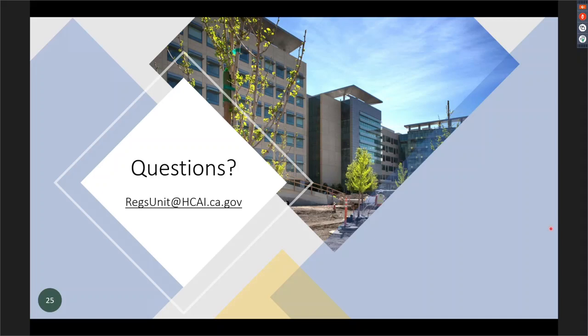Do not ask us to review RFIs, because our staff are told, do not review RFIs, so you're going to get a no. Now, again, if you have an RFI, you're not sure if it's NMA or not, and you say, can you look at this to tell me if it's NMA? Go ahead and ask the question. Just make it clear that you're not asking them to review your RFIs. There are several questions on this, very similar on this presentation alone. We got a lot yesterday at the presentation we did, the same type of question. So again, using proper terminology is going to really help distinguish between what's NMA, what's RFI, what's ASI.